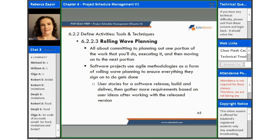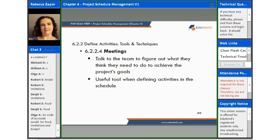Rolling wave planning is all about committing to planning out one portion of the work that you'll do, executing it, and then moving on to the next. Software projects use agile methodologies as a form of rolling wave planning to ensure that everything they sign on to do gets done. User stories for a software release — they build and deliver, and then they gather more requirements based on user ideas after working with the release version.